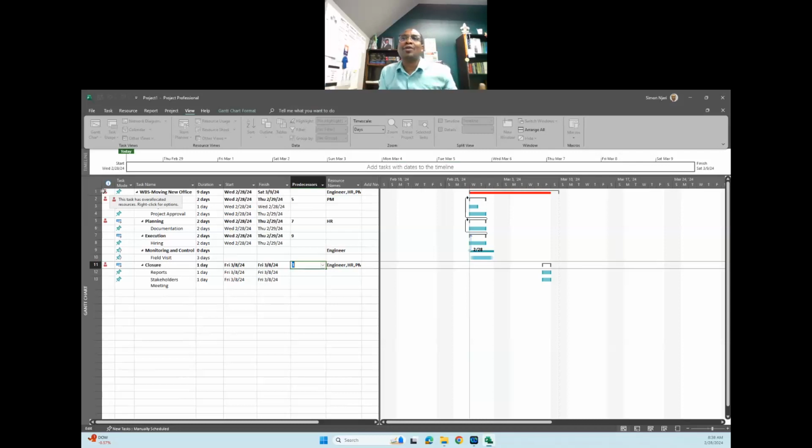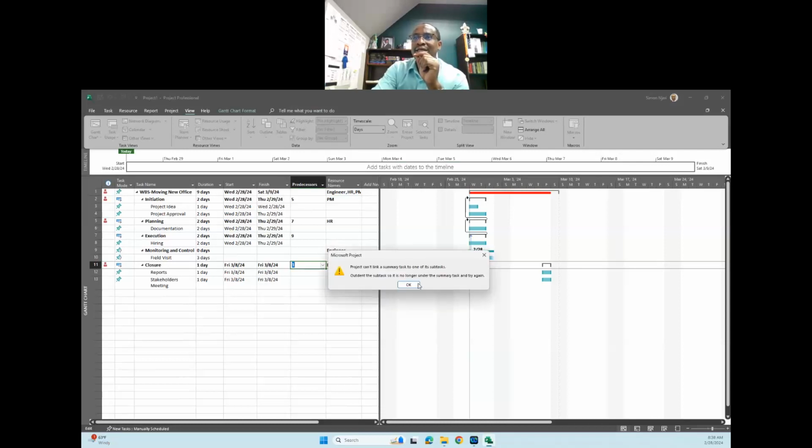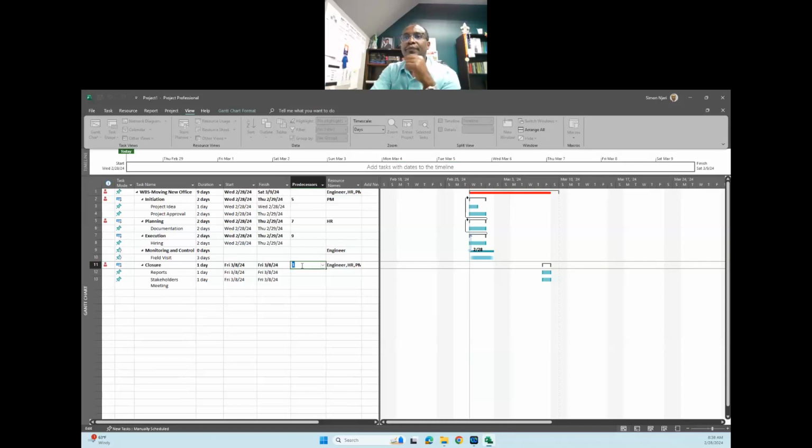And it is even telling us it has been over allocated. So there is an overallocation of resources, like we have the engineer, we have the human resource. But for now, this one just shows us that already the tasks have been allocated. Wherever there is this icon, there is the resource person on this other side.